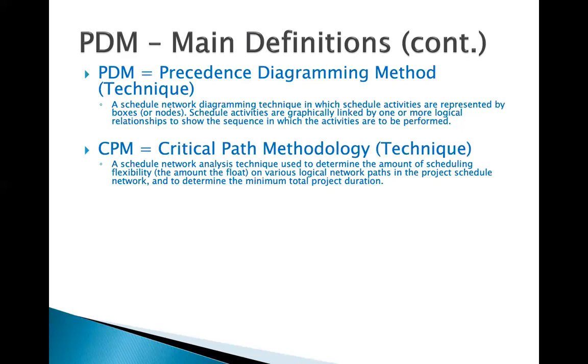The CPM is another technique that, combined with the PDM, allows us to calculate two things for the project: the project duration and also the total float or slack.